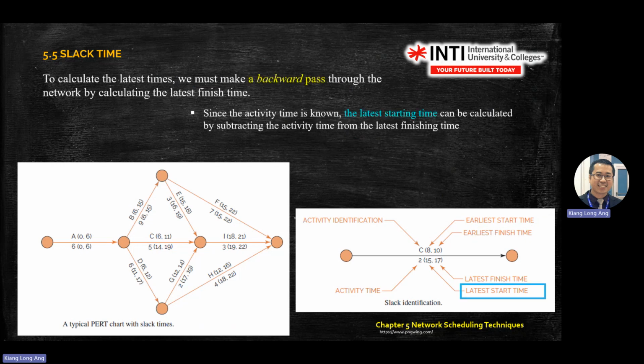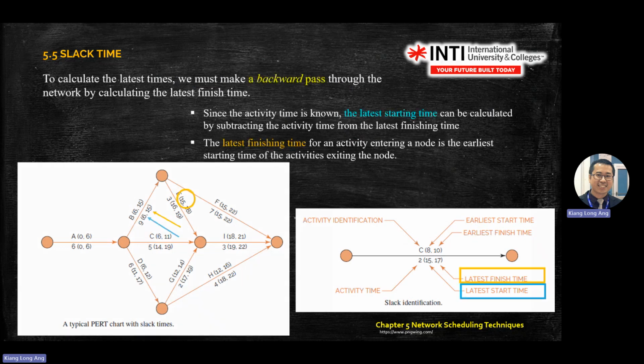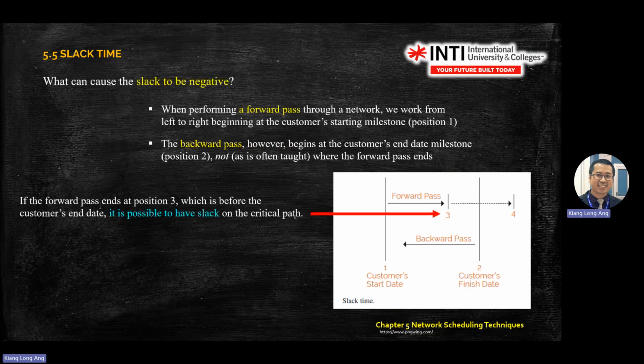Okay, the rest you read from the slide. Actually, it keeps repeating what we have covered so far. We also covered in the previous class what is forward pass and what is back pass. So again, what is important for forward pass? What number do you use if you need to make a decision? You be conservative. You take the maximum number. If you work from the back, the backward pass, you choose the minimum number. Means the way you fill in LS and ES.